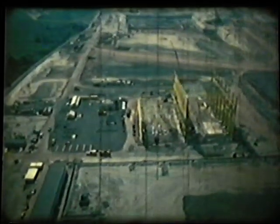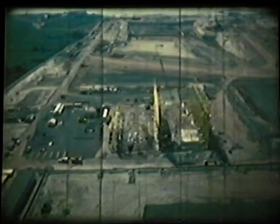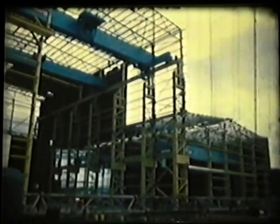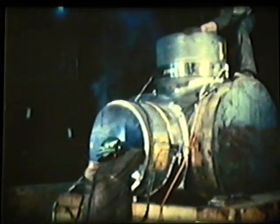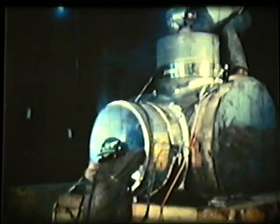Over the summer period of 1972, there was extensive development elsewhere in the yard, construction of stores, offices and fabrication shops. 200,000 square feet of buildings, of which the fabrication shops took precedence. For inside these structures, the complex welding of component parts for vast marine structures would be done. In fact, by August 1972, these were fully operational and contributed half the nodes for the first structure, Highland 1.